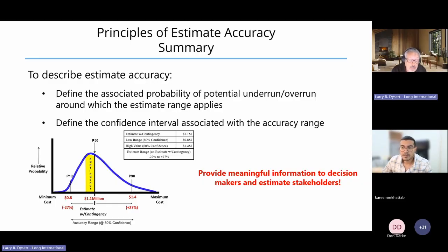The other thing that's really important, and is stressed in our AACE risk analysis recommended practices, is that we shouldn't be estimate ranging at line item levels of the estimate. In other words, we don't throw a 3-point range around every element of our estimate. We define the risk drivers, and the risk drivers are not at that element level. The risk drivers are things such as quantity growth at either the overall estimate level or at the discipline level.